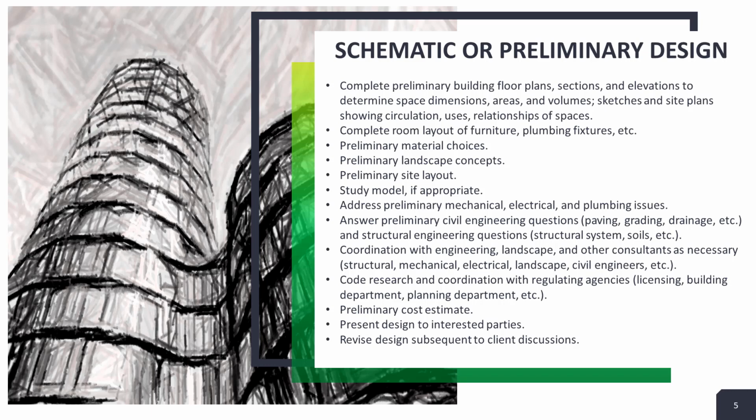It's really important that after we complete each one of these phases that we get the owner to sign off and approve it, because our original fee for the project is based on a certain amount. So if we get all the way through construction documents and then the owner decides to make an extreme change, we need to be paid for that. So by having them sign off at each phase, then if we have to go back and redesign, we can charge additional fees. So again, you can read through the work in this phase that is typically included.